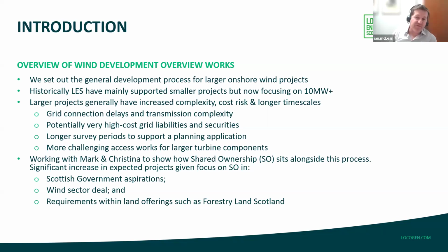Also, for a large wind farm, planning timelines are probably doubled on average, and this comes with significantly more cost at risk. And finally, and understandably, larger wind farms are nowadays looking at delivering turbines with blades of 70 to 80 meters, which dwarfs those smaller wind turbines that were generally the scale that community projects were going for.